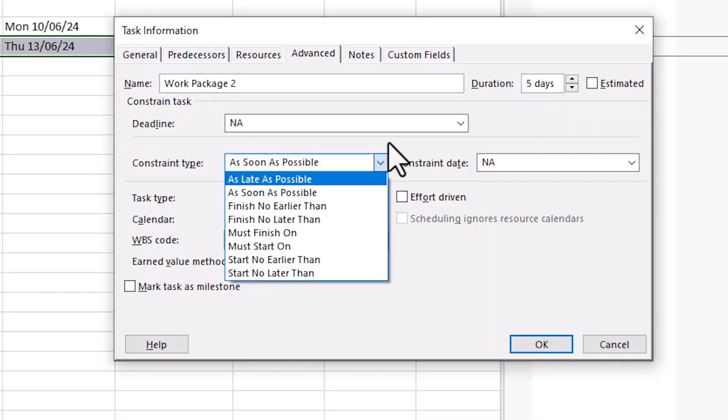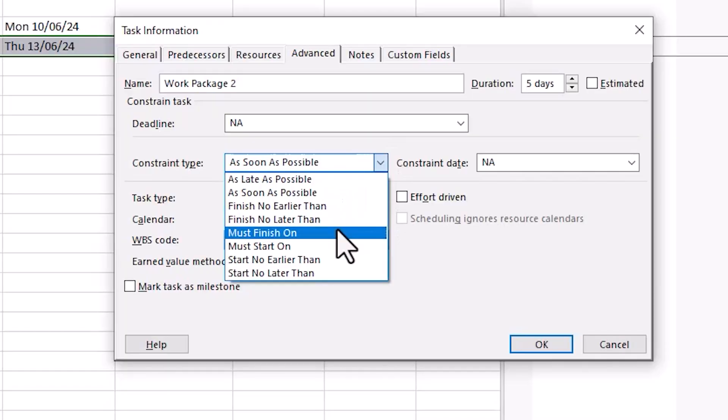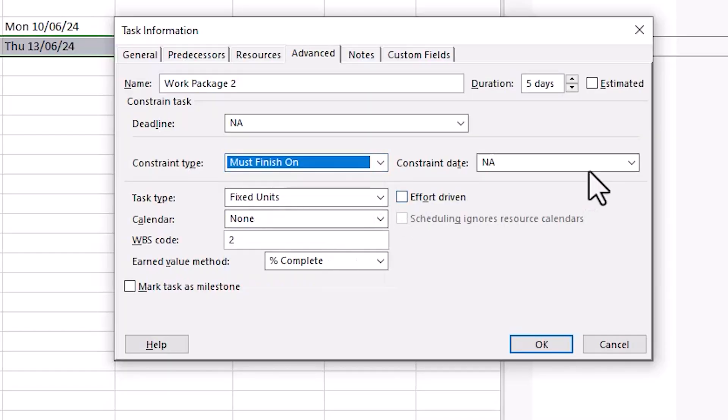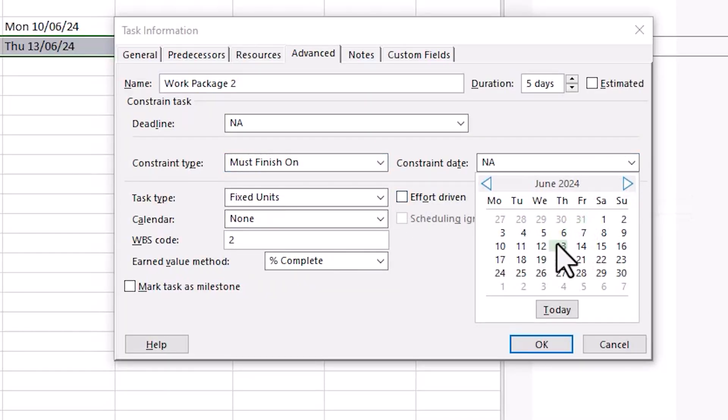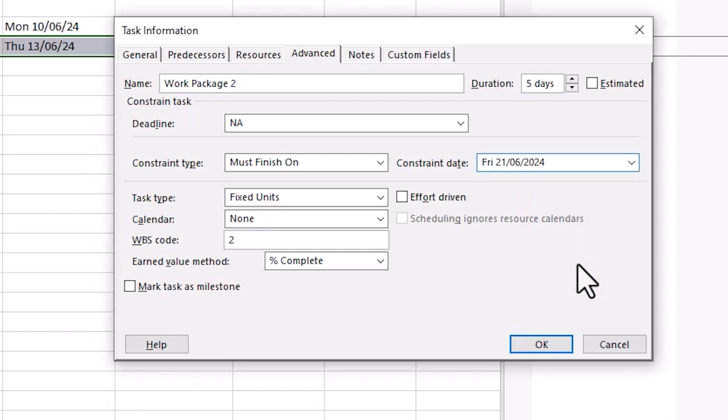This includes finish no earlier than, finish no later than, must finish on, must start on, start no earlier than, and start no later than. In this example I'm selecting must finish on and then setting a date from the constraint date options. This will mean that no matter what the task must finish on that date.